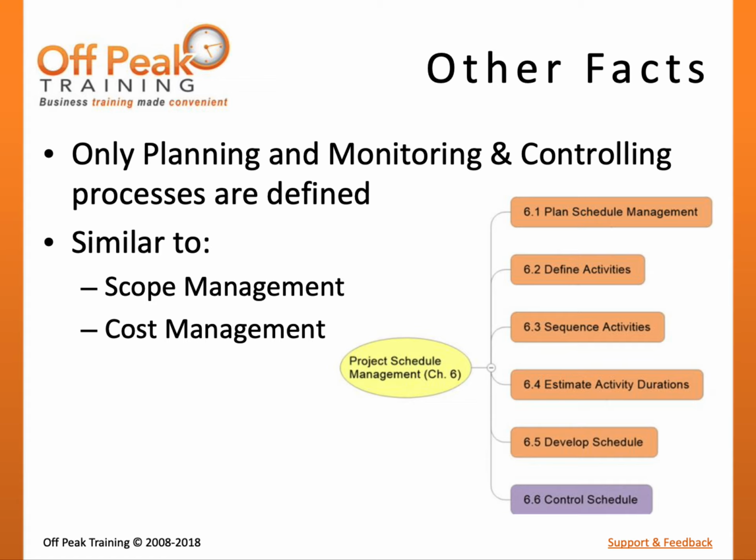Some additional facts worth noting about project schedule management are that it only includes processes in the planning and monitoring and controlling process groups. There is no need for executing processes, since all of the project work is performed in the integration process, direct and manage project work. You will also find that there are several similarities or patterns to the way scope management, schedule management, and cost management are defined. We will explore this in the mid-course review.